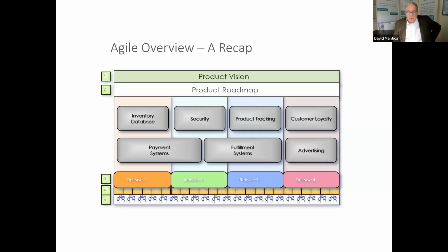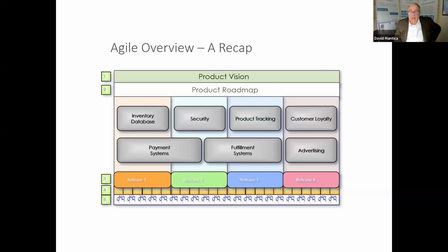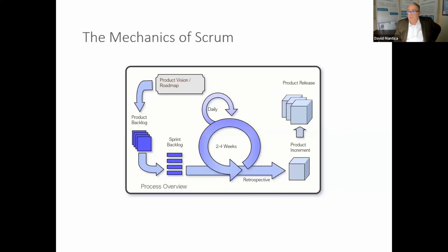So inside number 4 is your Scrum model. Ultimately, you're going to have a bunch of 3s as a product backlog, a bunch of release ideas. Here's all the different things we should be doing. And then they're going to be broken down into tons and tons of user stories based on the functions. And business analysts, Sonia, will be involved in creation of those user stories so that you can create a backlog. Then you're going to look at that backlog and decide your sprint backlog.